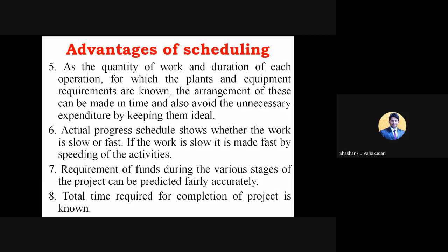So in the scheduling part, every activity's process will be known, such as what requirements, resources and all, this particular activity requires. So we can keep that ready at the earliest time, because if any delay happens with any part of the resources, it is going to affect the entire duration of the project work.